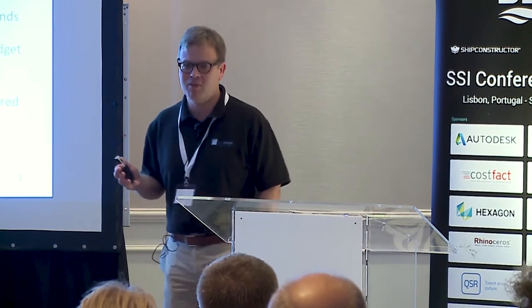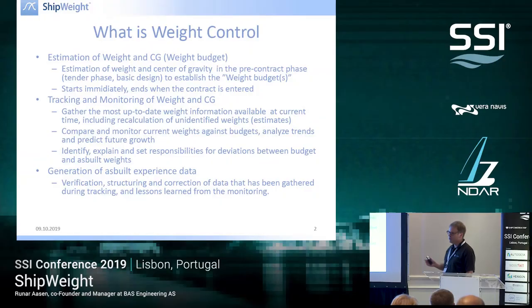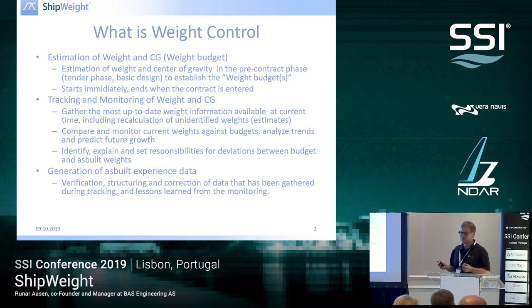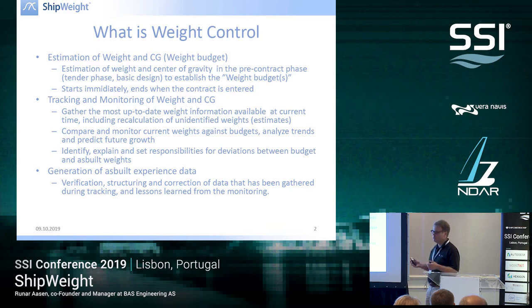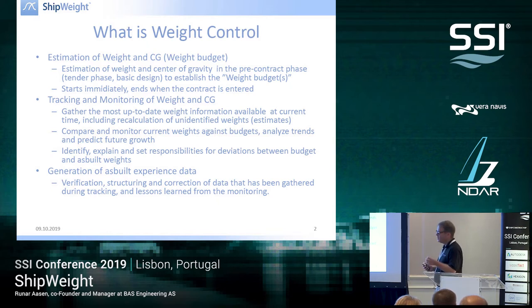Just to give a little background before we dive into the features of the software. We divide weight control into three main blocks. The first is what we call estimation — estimation of weight and center of gravity with the purpose of establishing what we call a weight budget. This phase starts immediately in the project and ends when the contract is entered.